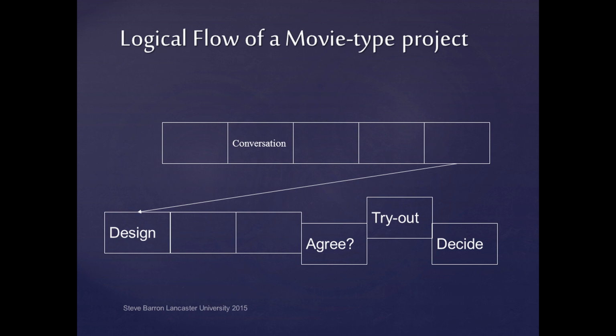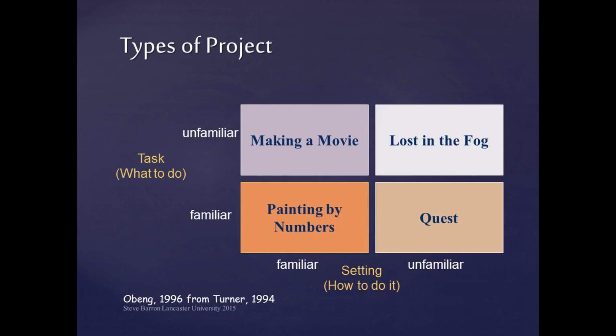Here, the approach is to design possibilities that can lead to agreement about project requirements through discussion and conversations with stakeholders. Once there is sufficient agreement, management can investigate how these requirements can be achieved. The management approach for these two projects is very different. Therefore, it is important to quickly identify the type of project you have.